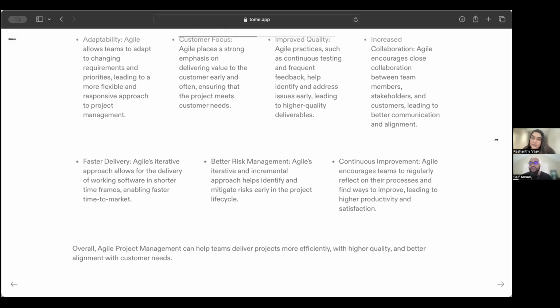You'll work for an org where I've had no choice. You've got to put in a change request that goes to a CAB committee that needs to do an approval. They could reject. They could ask for documentation and all this. So you're working on all of this stuff on the side while managing your team.